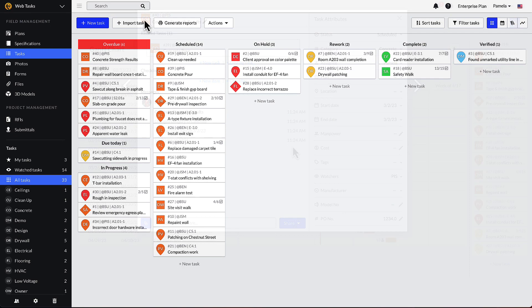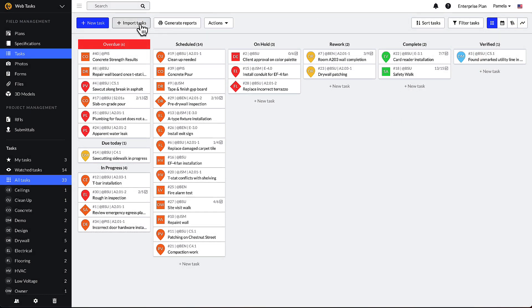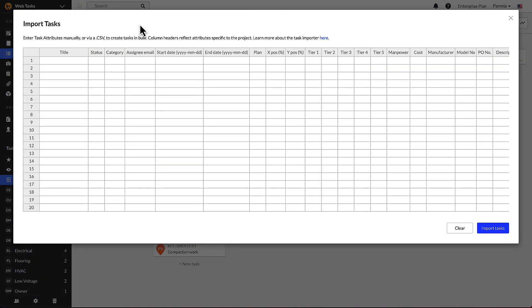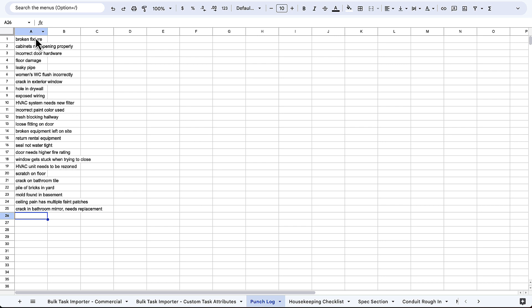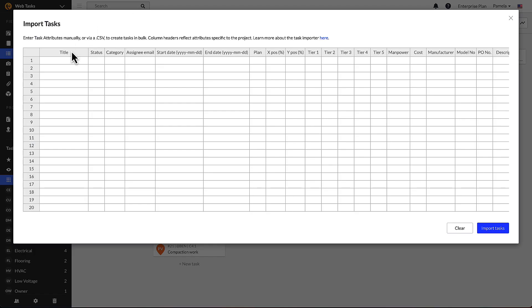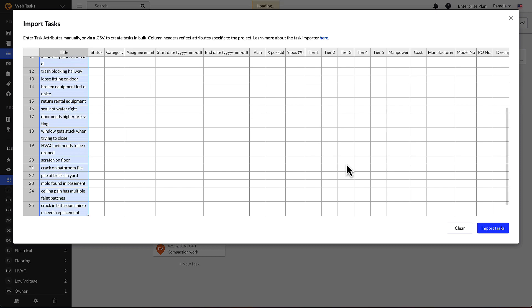The bulk task importer is accessible from the task tab. It allows you to create up to 500 Fieldwire tasks at a time. This is the best way to import tasks from another source or create repetitive tasks across the project either proactively or reactively. For example, it is easy to copy over an existing spreadsheet of punch list items or a running equipment list for ease of field coordination.